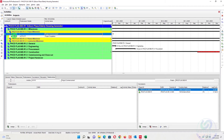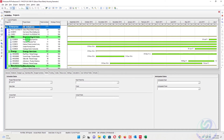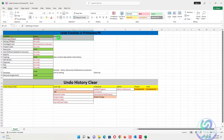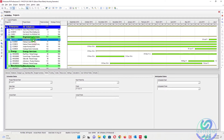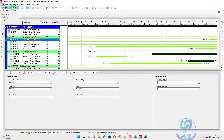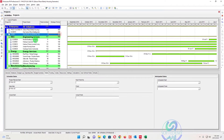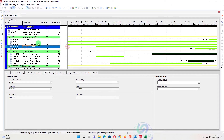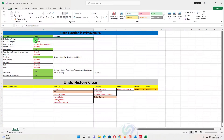First of all, in Primavera P6, I will go to the project tabs. If you change or delete a project, or edit any data here, it cannot be undone or redone. I will show you an example — if you delete this one, it cannot be undone. It's written clearly. So if you want to see the functionality, there is an undo option, but if you delete this one, undo will not appear here. Also, if you edit or remove this expansion, there will be no undo for that either.